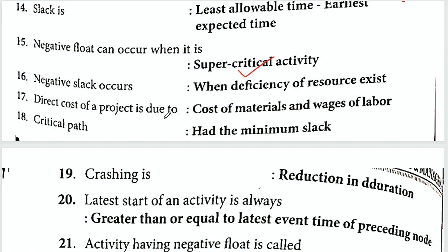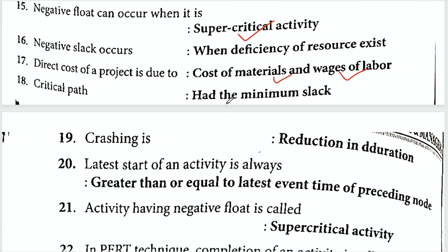The direct cost of a project is due to cost of material and wages of labor. The activity having minimum slack is on the critical path. Crashing refers to reduction in project duration by adding extra machinery or resources.